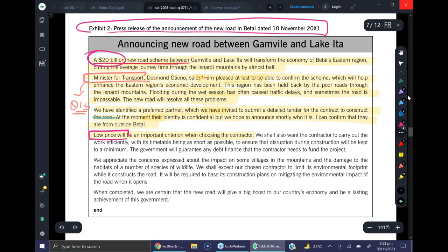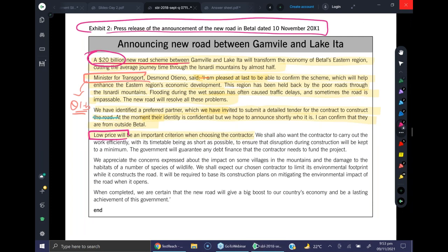minister is highlighting? So this might be difficult for us to meet, because it is the construction of road in mountains. So there might be some weather issues, there might be some delays which will affect the cost, which will increase the cost. Yeah, it can lead to more wastage of materials maybe, which also means more cost.